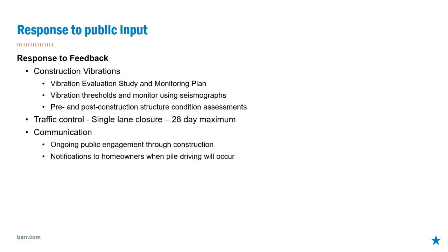And then we're going to do pre and post-construction structure surveys. So we're going to go out, we're going to look at the sites that people allow us into and ascertain their condition before the project and then come back and check afterwards to show that everything's the same, we haven't caused any additional damage. Then the traffic impacts, it's just a single lane closure for a maximum of 28 days. It's a relatively quick project. It's a relatively minor traffic impact.